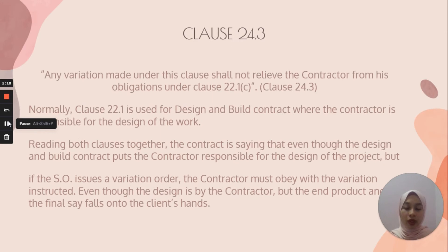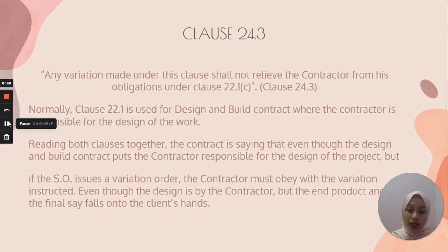Next is Clause 24.3. Normally, Clause 22.1 is used for design and build contracts where the contractor is responsible for the designs of the work. Reading both clauses together, the contract says that even though in a design and build contract the contractor is responsible for the design of the project, if the SO issues a variation order, the contractor must comply with the variation instructed. Even though the design is by the contractor, the final say falls into the client's hands.